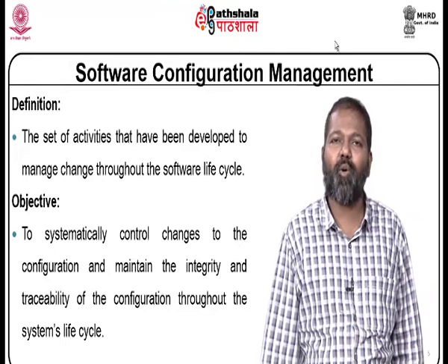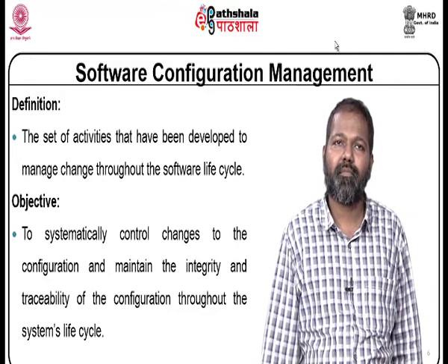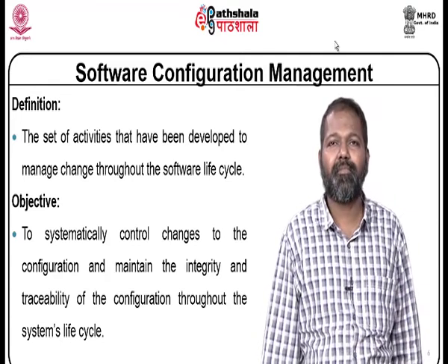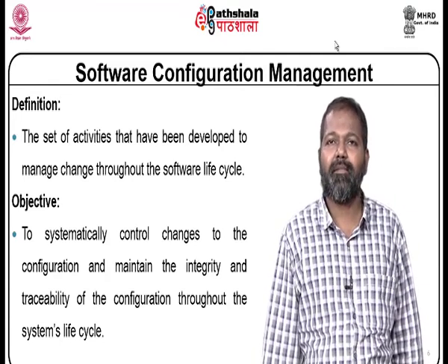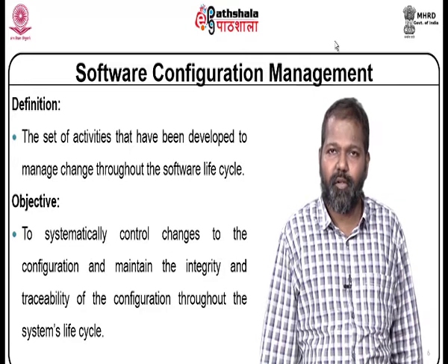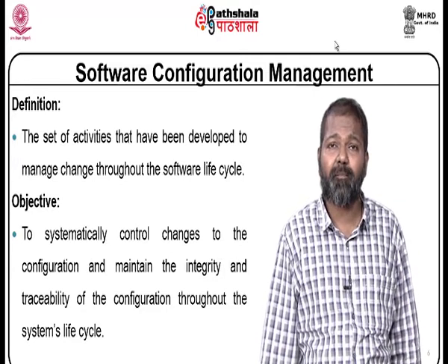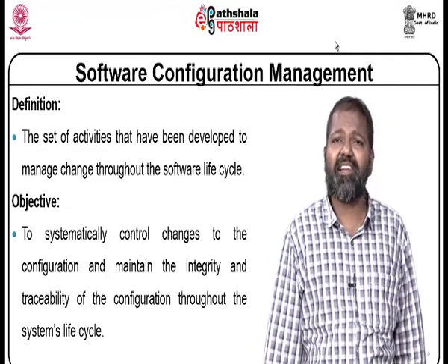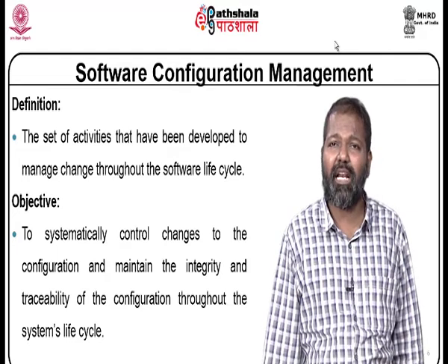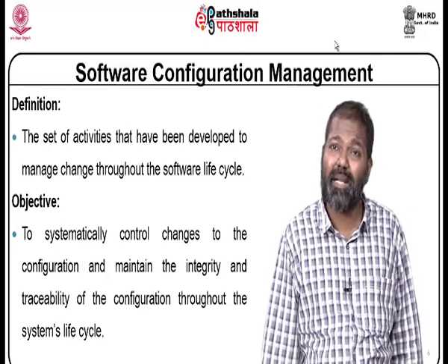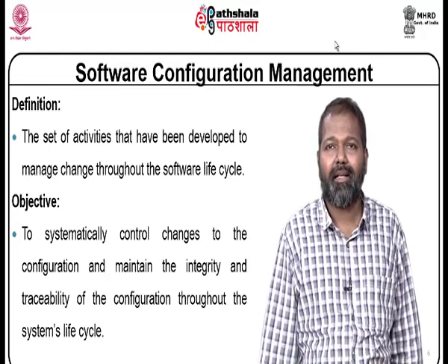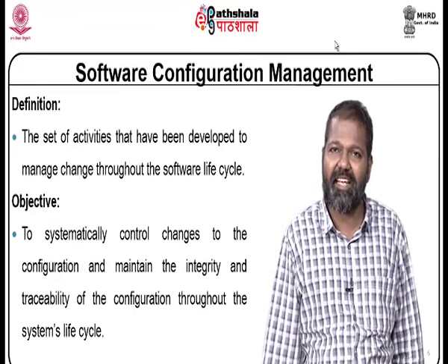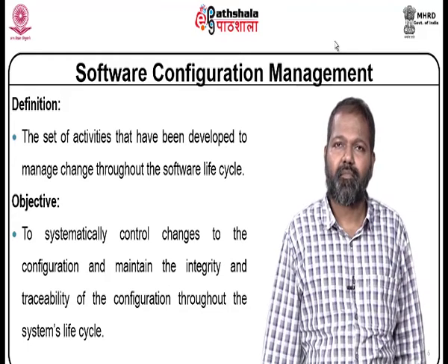If there is a changing requirement, in all the previous phases the corresponding change has to be done, and if necessary you may have to test the entire software or part of the software. Regression testing is one testing that is commonly used when a completely tested software is modified to incorporate changing requirements.